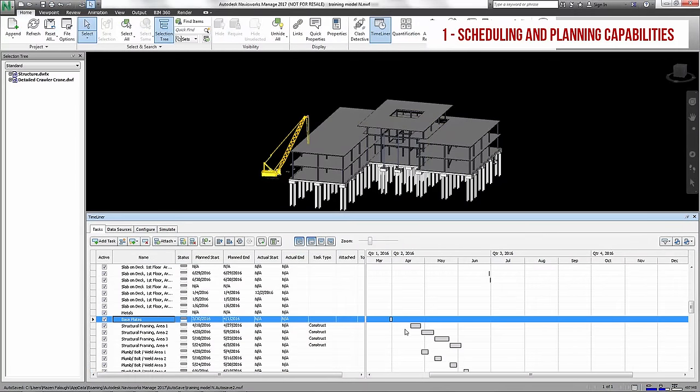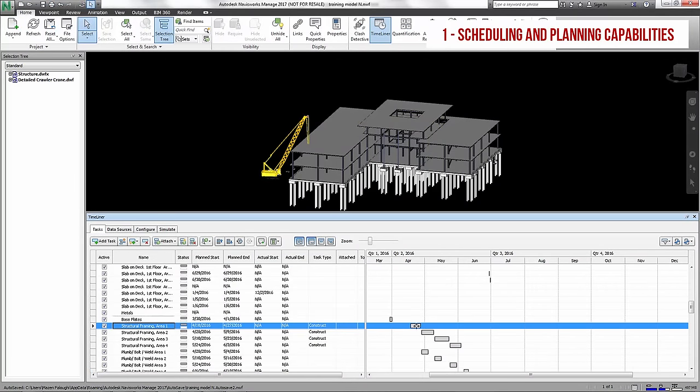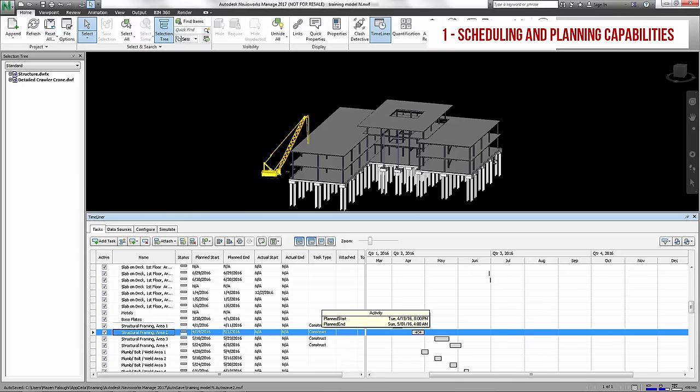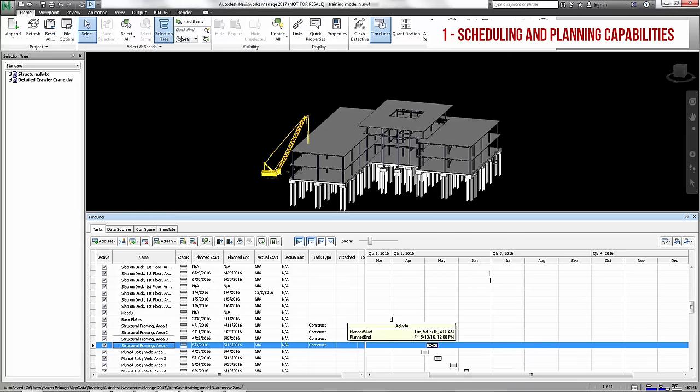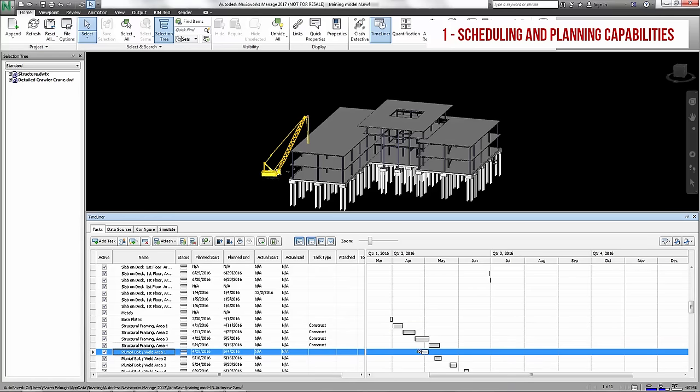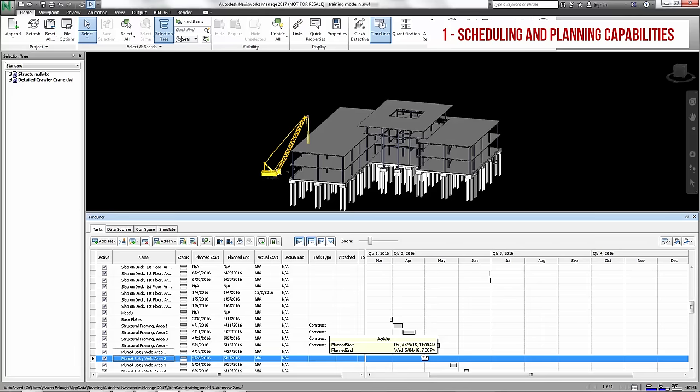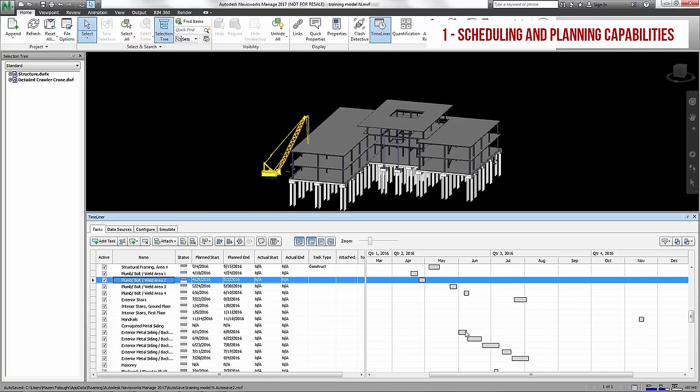Timeliner, on the other hand, will ignore all the schedule logic, turning it into a series of independent start and finish dates. This makes it close to impossible to realistically see the effects of a change on the rest of the schedule. Even basic operations such as adding the duration to a start date to get the finish date cannot be done in Navisworks Timeliner.